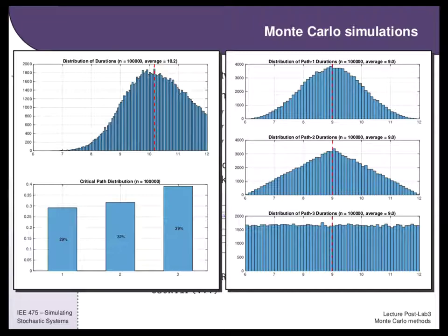And so the reason you see this bias towards the bottom one being the critical path is that it actually has probability that is still highly represented over here in the high times. Whereas as you keep adding these together, the central limit theorem pushes their tails down, and so they become much more clustered just around their mean. So that was the interpretation.